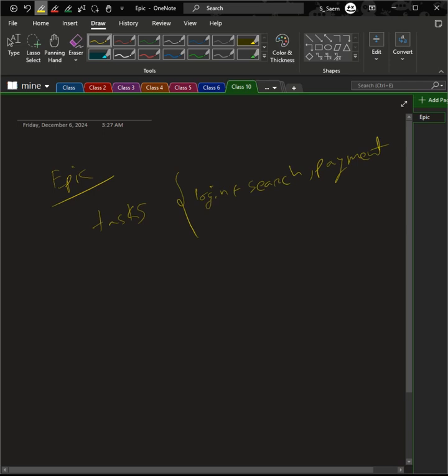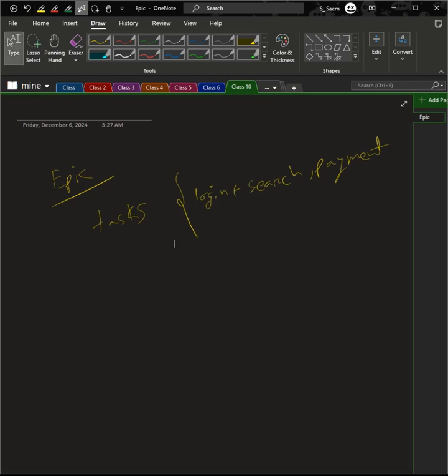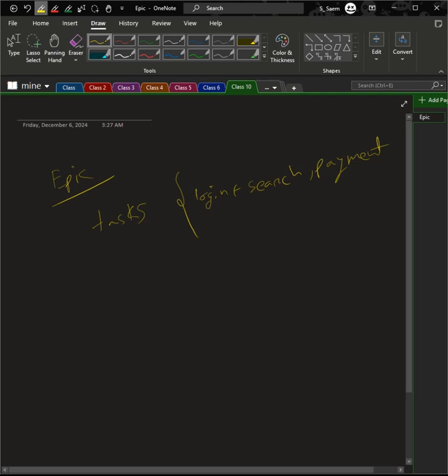But let's not just define it, we'll dive deep into it to make it more relatable. So every company works epic by epic. Why? Because in a product backlog, all the user stories are scattered randomly. Like user story one, user story two, etc. To organize them and prioritize what's essential for the user, we group these user stories into epics.